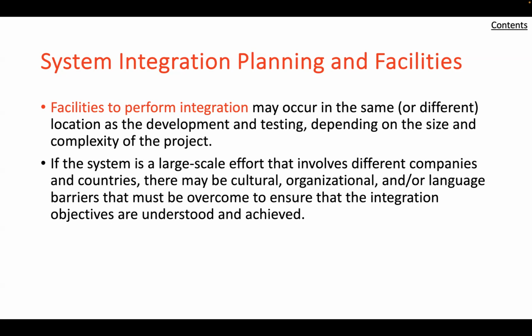This part of the lecture describes the general process and problems involved in integrating a typical complex system. The successful and expeditious integration of a complex system depends on how well it has been partitioned into subsystems that have simple interactions with one another and are themselves subdivided into well-defined components.